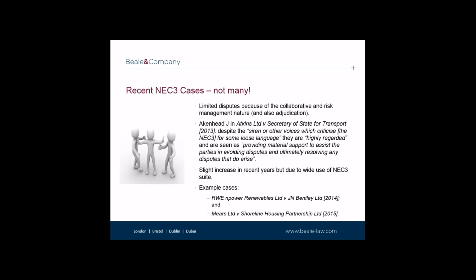but also by representation. The takeaway from this, again, it's a good reminder to everyone to ensure that contracts accurately reflect what has been agreed and to try, if at all possible, to sign contract documents before starting work, because retrospective agreements are fraught with risks and difficulties.